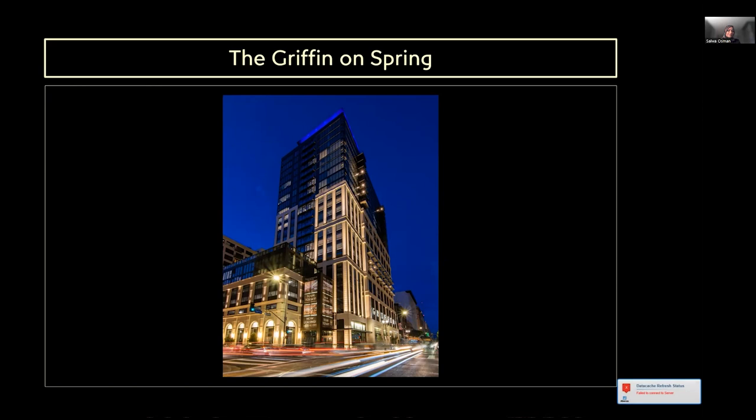The first part of the question, the site visits: usually for construction administration, once the project starts construction. You don't have to visit it often because a lot of the issues are communicated via RFIs, requests for information, or obviously if it's needed, you'll go up to the site. But usually every project has a contract that states the number of site visits for punch walks and acceptance of the building and all of that. So it all depends on the budget of the project, because obviously it's time spent driving or traveling to the project site. I would say in total about 4 times.